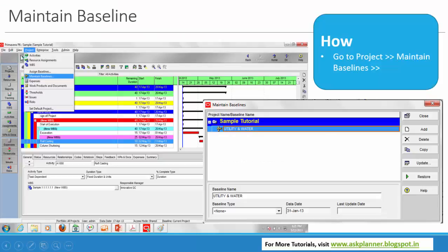There is an option where we can click on this project and click on maintain schedule. You can maintain the existing perfect signed off schedule as a baseline when you're done with the scheduling, before getting into execution mode and getting into this site level document. So once you sign off the schedule, we maintain this signed off schedule as a baseline.